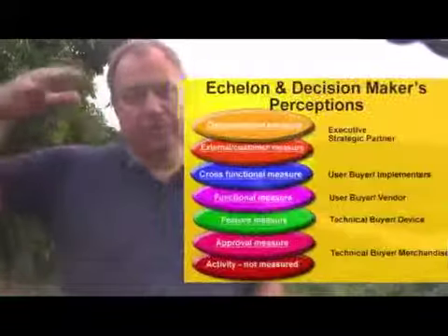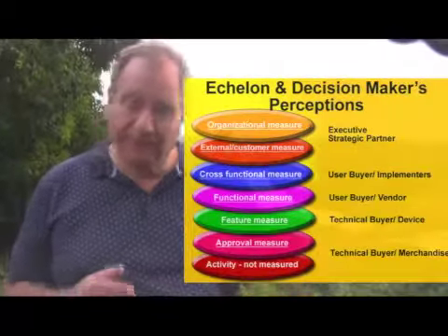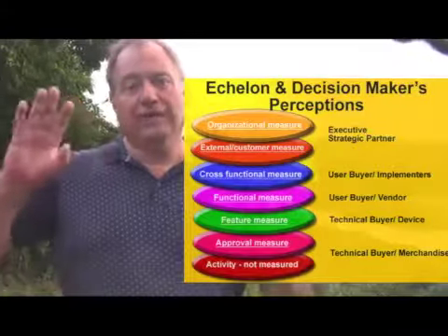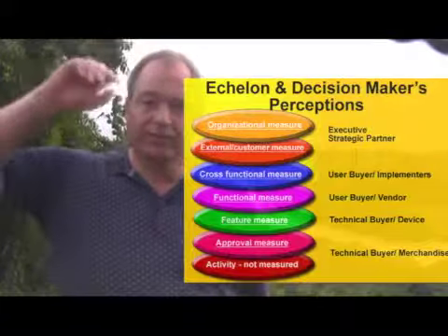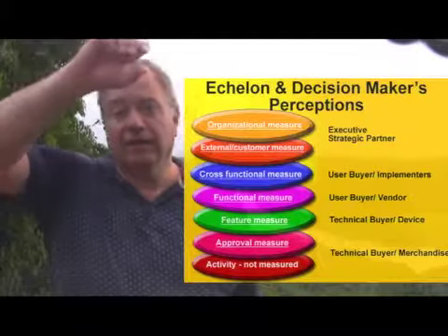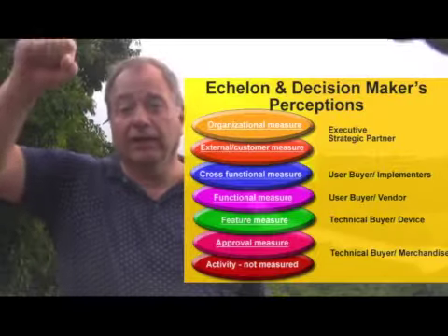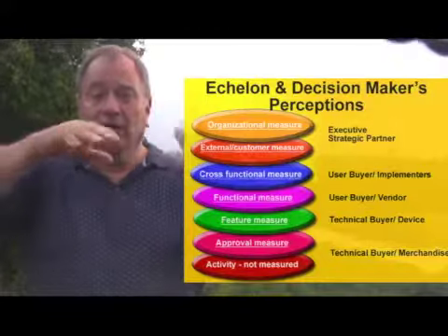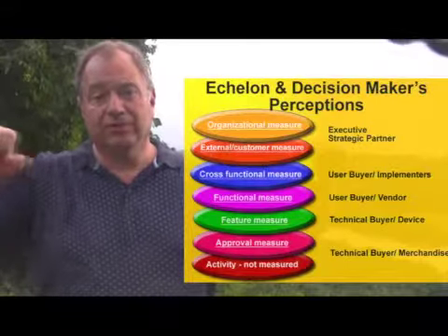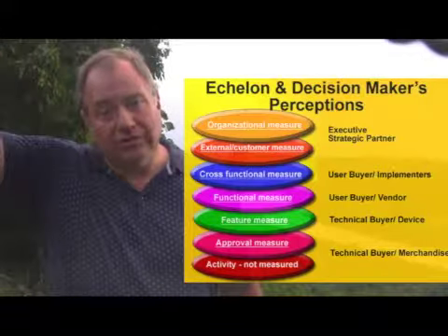I think you can also see how these echelons fit into the achievement network design that we talked about in the first module. If I'm talking to the senior executive in an organization about improving our market share, that's in the customer and external area, and I probably would come down a level and say, what organizational level achievements do I need to support that external echelon achievement?